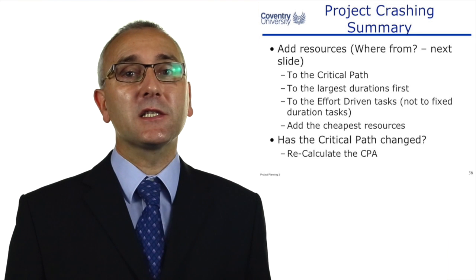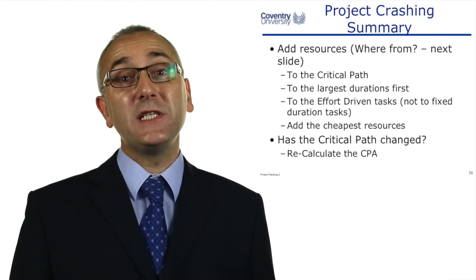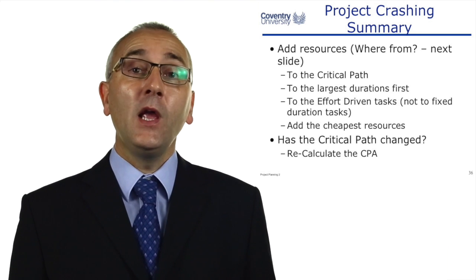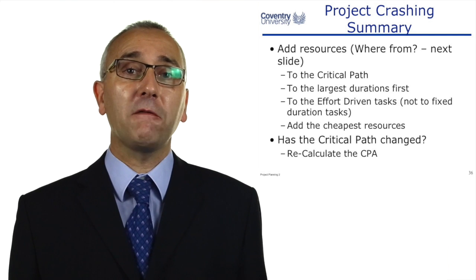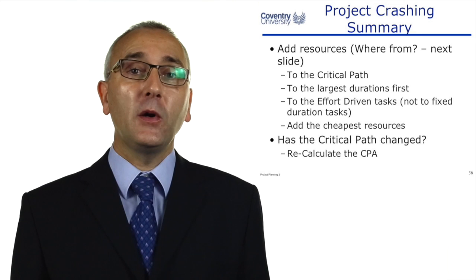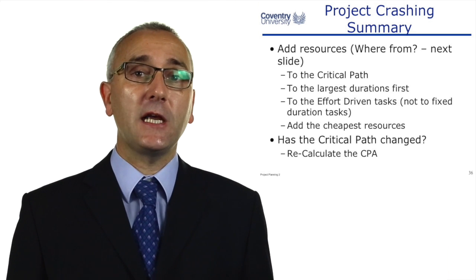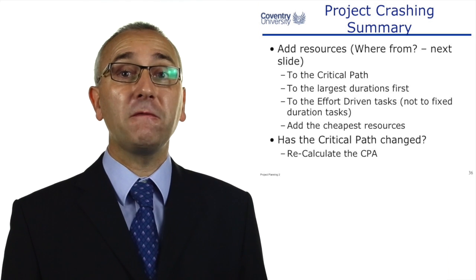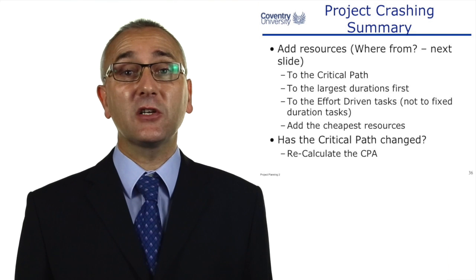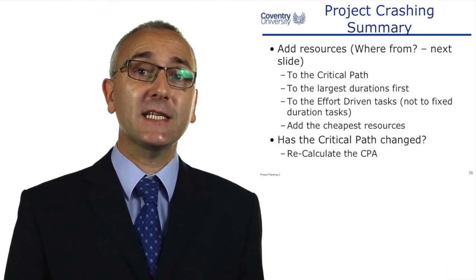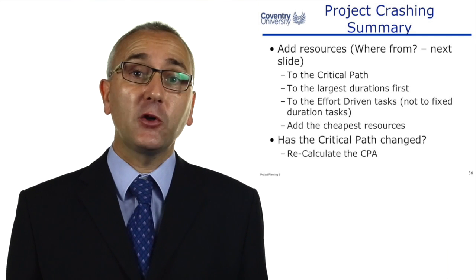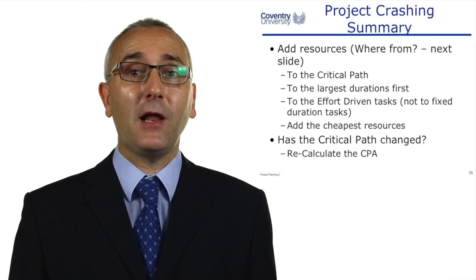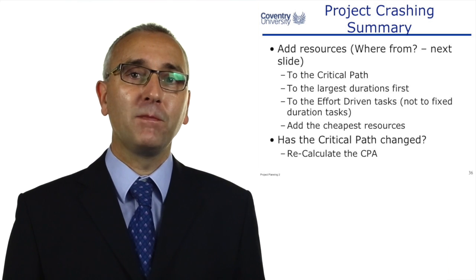To reduce the duration of tasks, you're going to need to add resources. Add resources to the critical path items, but also optimize the non-critical path items in case they become critical. Look at the biggest duration tasks first — if we can halve a 10-day duration, we immediately save five days. If you only look at small durations, a two-day duration halved only saves one day. Look at the effort-driven tasks — there is no point in adding resources to fixed duration tasks.